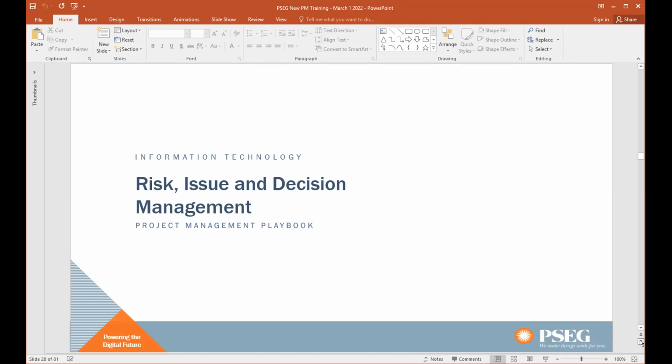You should be able to pass the gate by providing the scorecard. So you prepare the scorecard, do the workflow, send it to the EPMO mailbox, get the reviews done, get the approvals, and move to the next stage. It flows smoothly once you start understanding the different pieces of this SGP. If you start somewhere and try to jump through things, it will be very confusing. So I just wanted to bring that clarity over here.